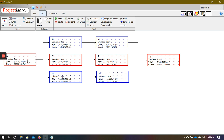And then we have the third path through this network at the bottom, which is path A, D, G, H. If we add the duration of the activities here — 5 plus 5 plus 5, which is 15, plus 8 — which is 23. So all three paths: the one at the top adds up to 22, the bottom adds up to 23, and the one in the middle adds up to 24. So which one is the critical path? It is the one through the middle, because it is the longest path through the network diagram, coming out to be 24 days.